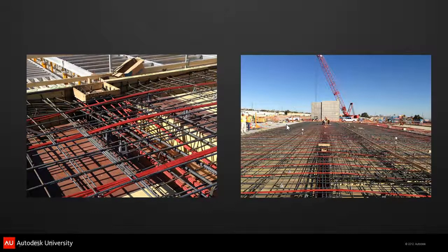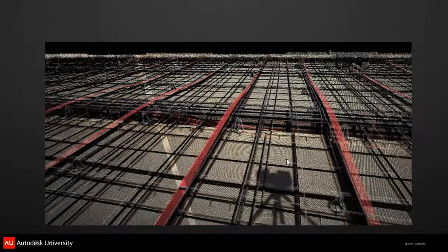Let's laser scan before each pour. And in doing that, we would then have a map of each of these tendons that have not been previously modeled. And so we were thinking five years down the road, you'll switch tenants in one of these areas, maybe add a restaurant in, they'll need some sleeves put in. And we went through and did laser scanning on it.